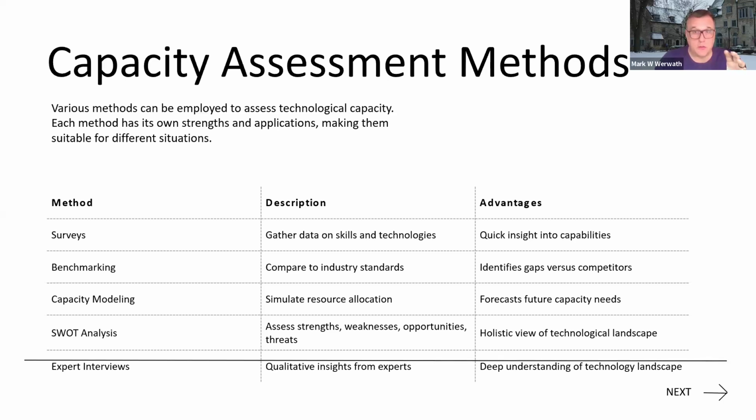so that at any point in time, your senior leadership can go to you and say, if I had to lay off 10% of your resources, what projects would be impacted? You should be able to tell them very quickly what the impact analysis is. Conversely, if you had 10% more budget allocated to you, what projects could you take on? What projects can you accelerate? What projects would then be bolstered in terms of maybe added scope, so that you can maybe do phase 2 and phase 1 in a combined fashion?